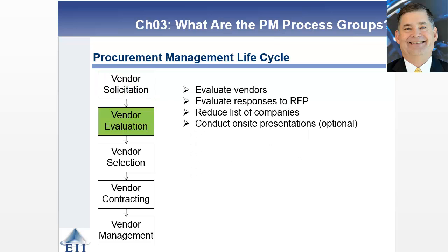So typically what you do is once you get those things in and need to start evaluating the RFPs, you're going to use some selection criteria. Those are questions that have a yes/no answer to limit the field. Let's say you had 300 companies respond back to a particular proposal.